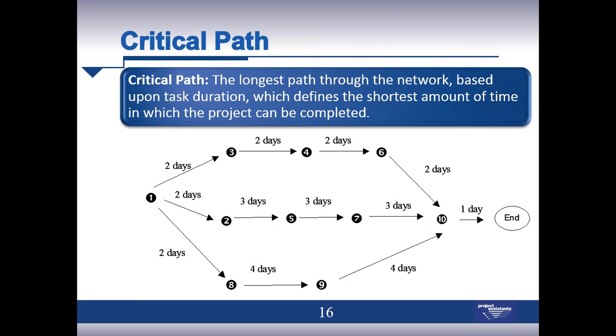So it's most important that as a project manager, we spend the bulk of our time looking at the critical path or the near critical path activities. Because there's items that are not on the critical path that can run late, can stray a bit, and overall will still be on track for the overall project.